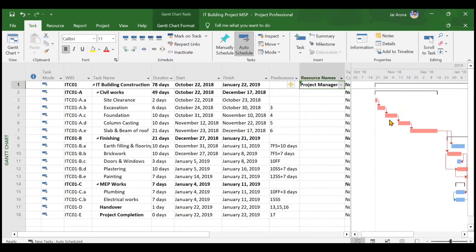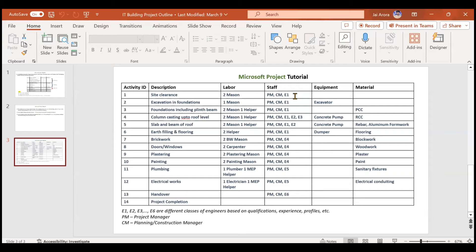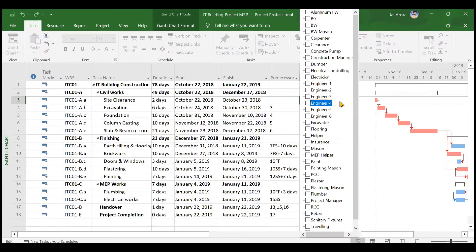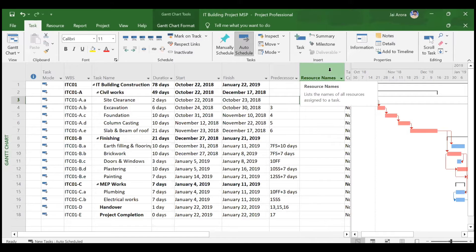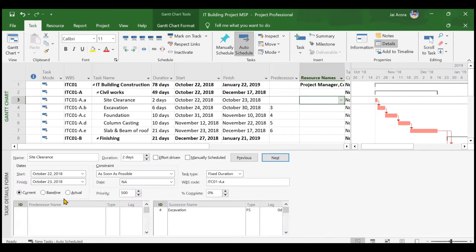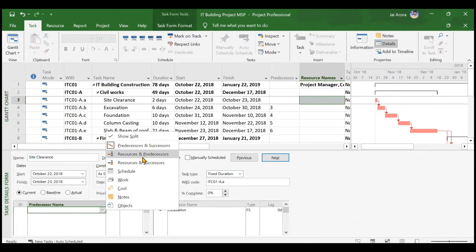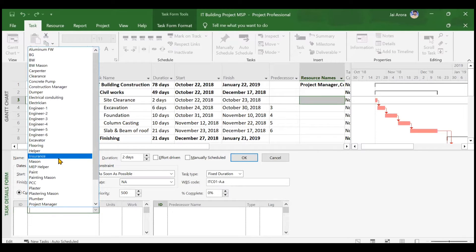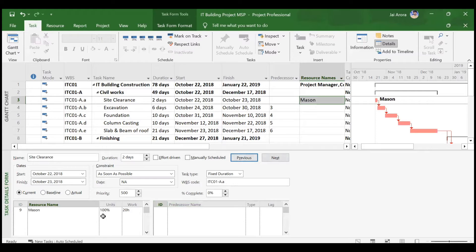Both resources have been assigned to the IT Building Construction project. Moving on to site clearance: the project manager and construction manager are already assigned. For site clearance, we also have two masons and one engineer. One method is using the resource name dropdown. Another method is opening the detailed view, right-clicking and choosing 'Resources and Predecessors,' and adding resources from there. We will go to mason and click OK — but only one mason has been added, so we will increase units to 200 percent for two masons.